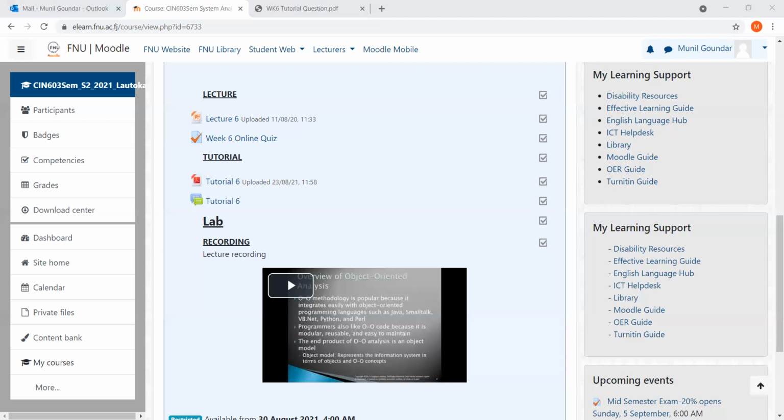And then it takes 2 days to finish. So 5 plus 2, 7 minus 1 gives you 6, 6th of July 21. Now next up, activity D has a predecessor of B. So B finishes on the 8th of July. So this would be the 9th of July 21. And it takes 5 days. So 9 plus 5 gives you a value of 14 minus 1 gives you 13. So 13th of July 21.